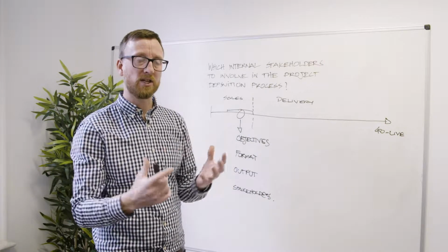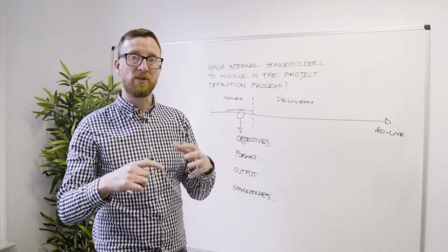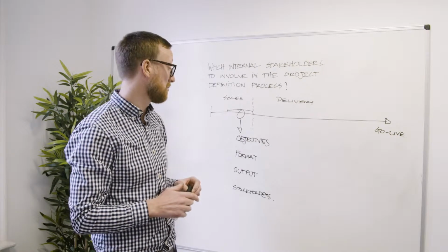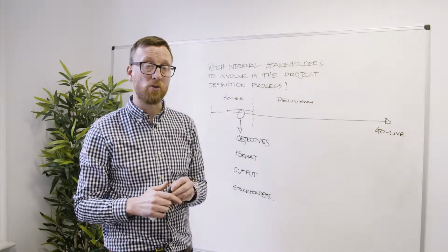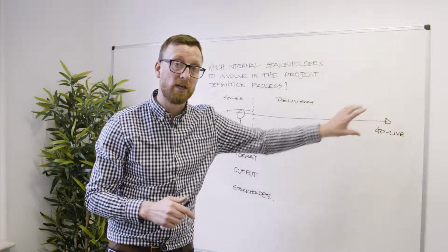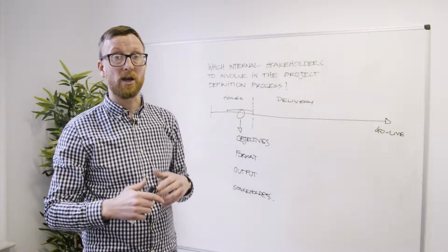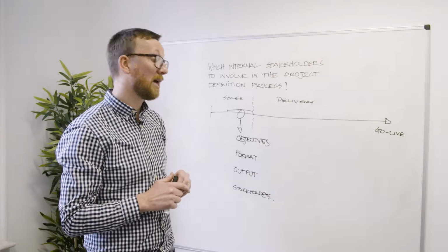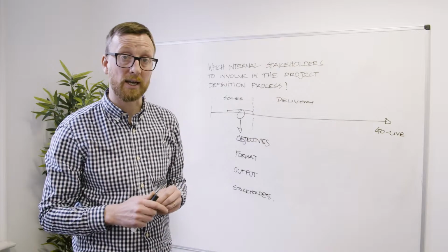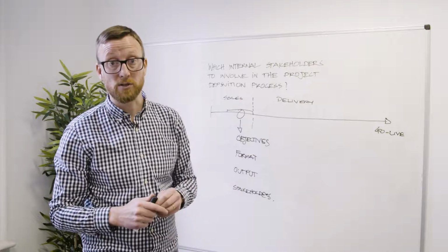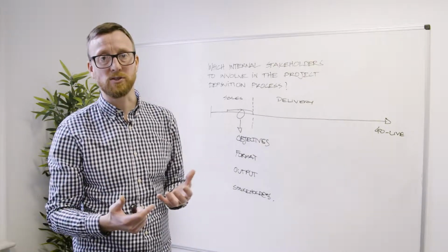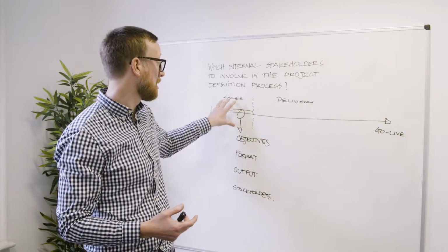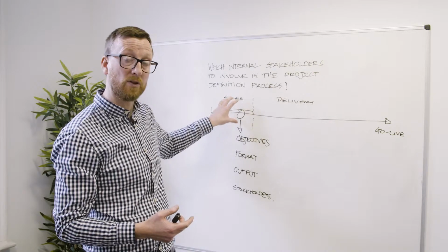So in the context of where it is in the process, business sponsors and decision makers are required to attend the session. Now, beyond that, you would have people who would be involved in the delivery. So you might want to consider having project management, members of PMO, technical people, maybe some technical architects, so that we can explain how the integration might happen. Because any questions that might arise within the client, we would hope to answer them within this project definition session, within this workshop.